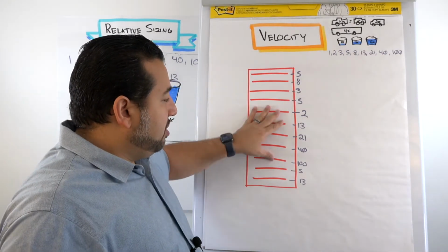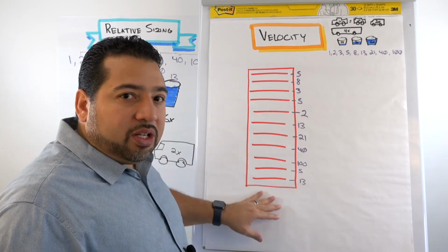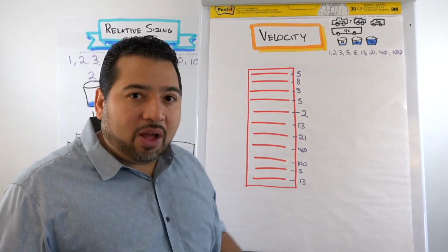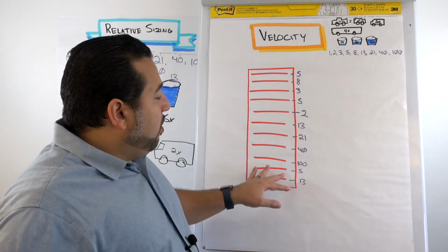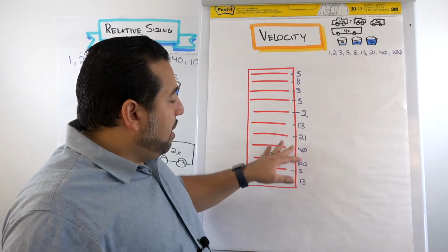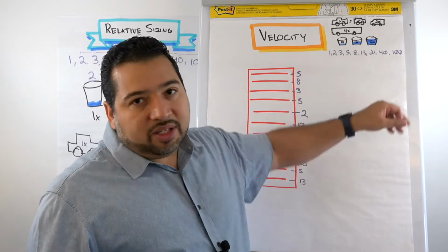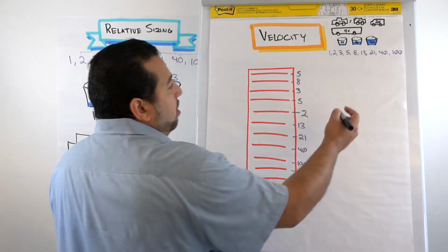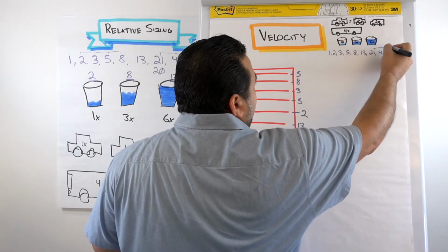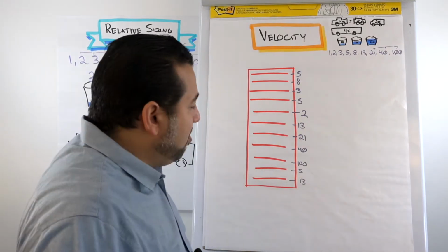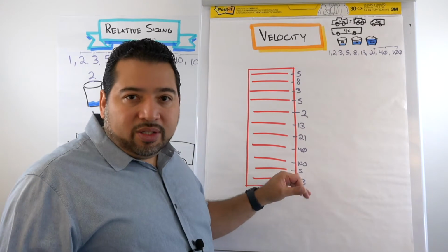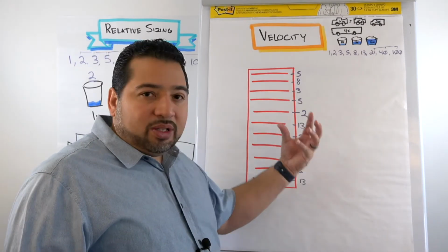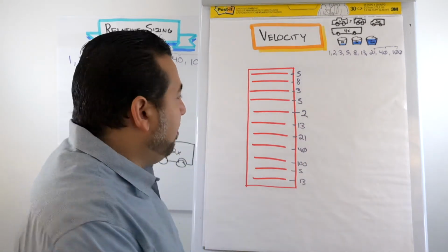Looking at these items relative to each other, what's their relative size? Not how long it takes you, but relative size. Now, the ones that are 40s and 100s down here, maybe the 21s, there's more uncertainty there. There's a lot more uncertainty in the larger numbers. And I have to decide, as the product owner, or whoever needs this information, am I okay with that uncertainty for this estimate, or do we need to break these down into smaller pieces to get a little more accurate on the estimate?